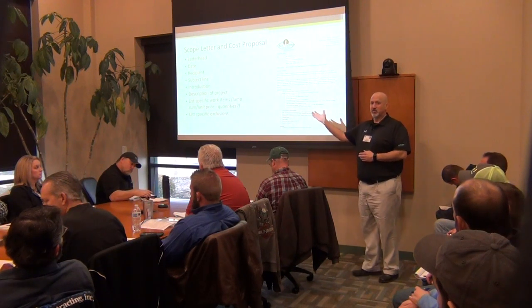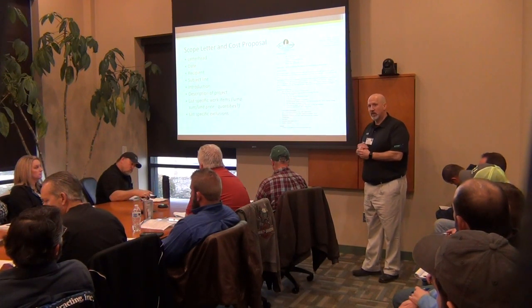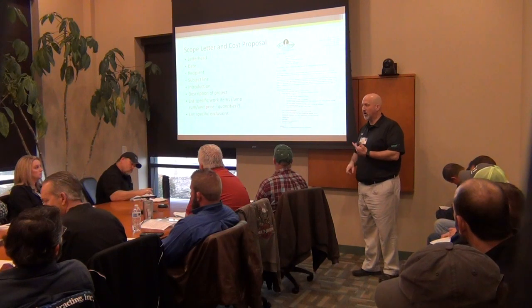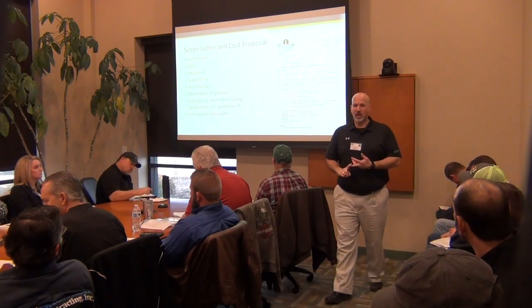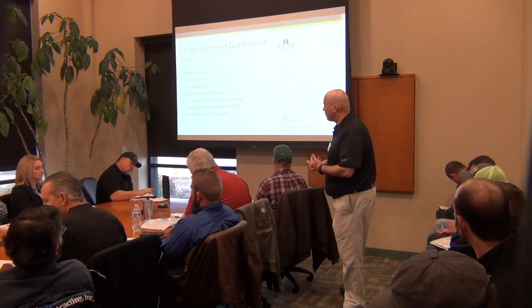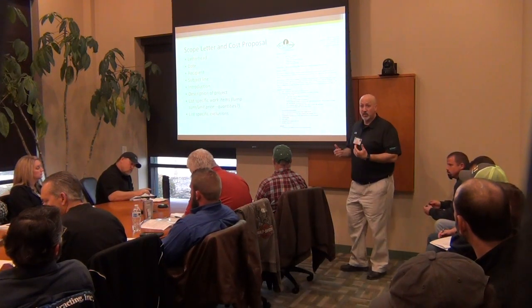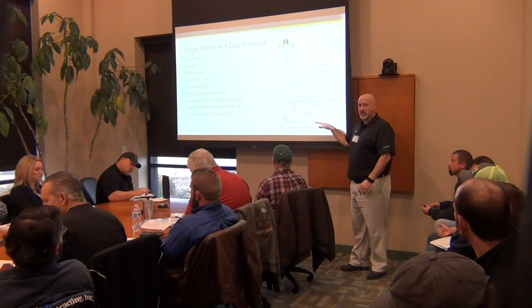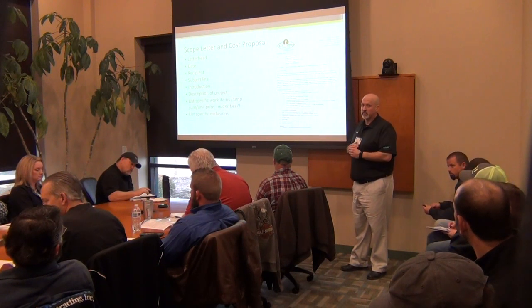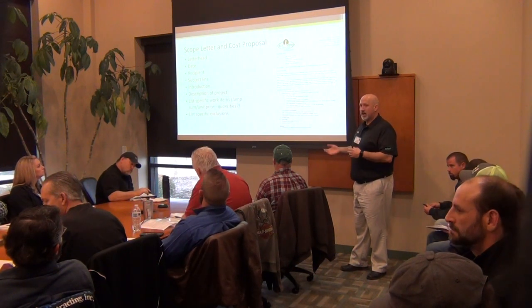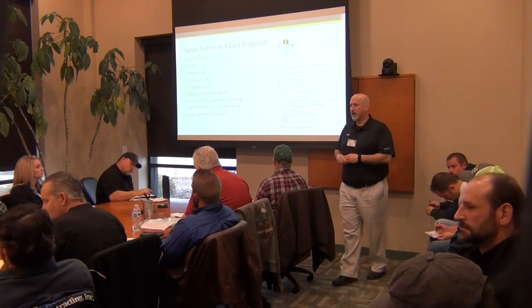We typically like to see them 48 hours in advance. We do a lot of technical work, water, wastewater treatment, power plants, industrial plants, where there's a lot of technical materials, equipment, and scopes, and we want to see that early because we've got to make sure they've got everything the specifications require. So from that standpoint, get your scope letter, just plan ahead.